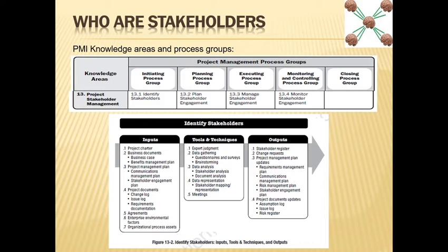And it's better that this register is always maintained with the high priority stakeholders on the top, because we know that a lot of the time things can go missing. So if you miss something, then you should be missing it from the low priority, even though practically you should not miss anything. You should not miss any project stakeholder.